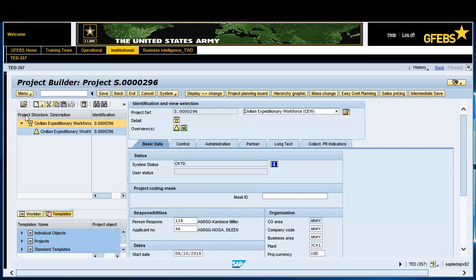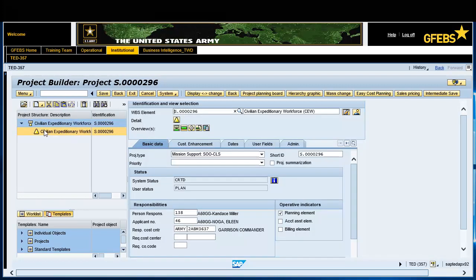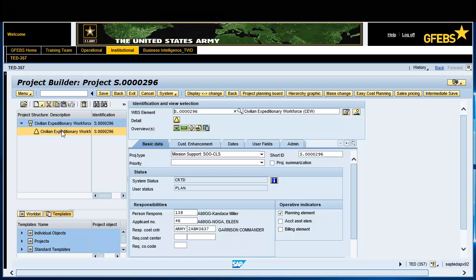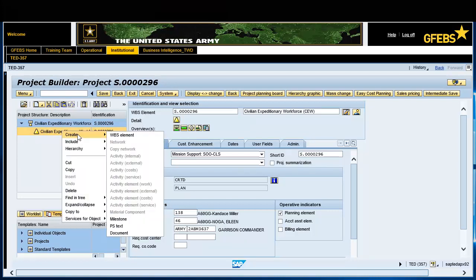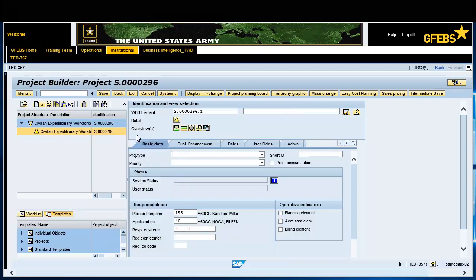Click on the Level 1 project to highlight it. Right-click on Level 1 CEW, then select Create WBS element. The system will automatically generate the Level 2 WBS in the Identification and View Selection section in the WBS element field.